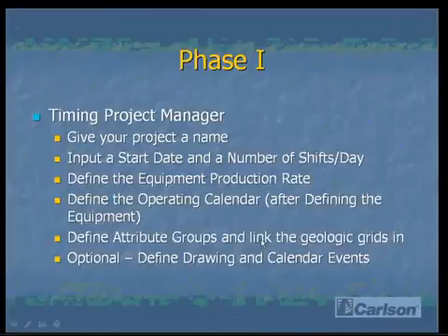And there's also the option where you can identify delays by placing text in your drawing, which we refer to as drawing events, or you can also add calendar events, which are input at the time when you sequence and schedule your mine in the mine timing.